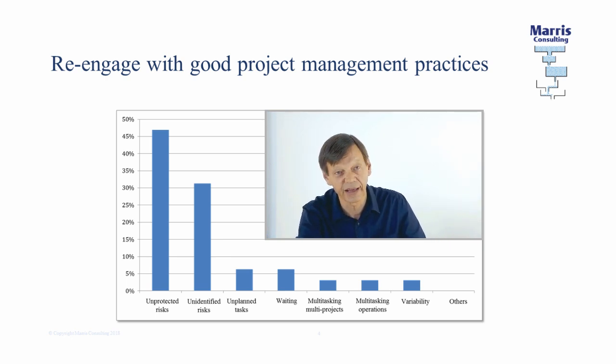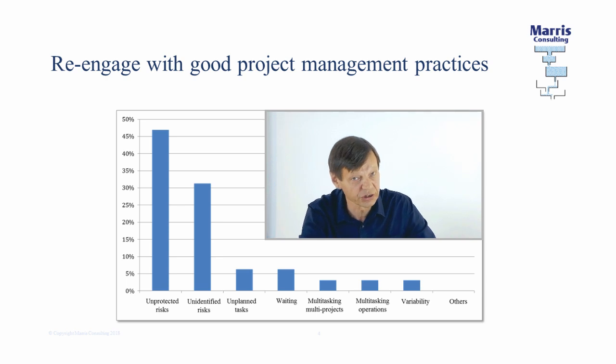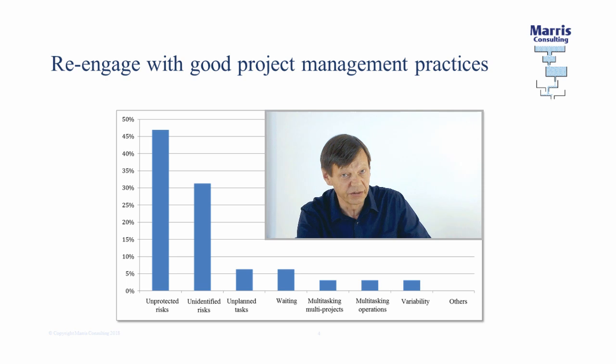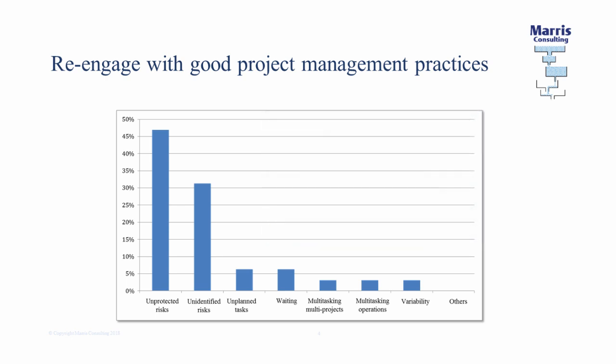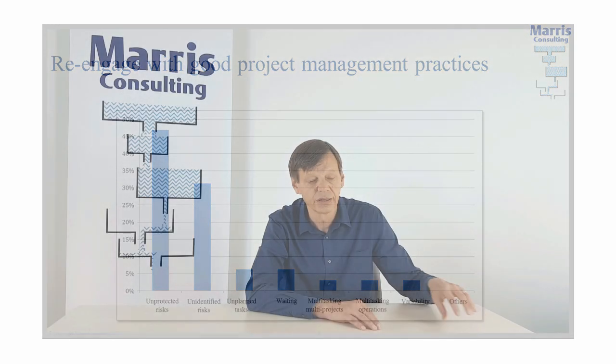Okay? Yet that problem, if it occurred, not only was going to cost money, it was going to take time to solve, right? So what they did was, from then on, not only did they identify and provision financially, but they provisioned in time, and they added that to the system, right? So that's a nice and easy thing, and I believe a lot of companies don't do that properly. Provision risks not only in terms of money, but in terms of time, right?